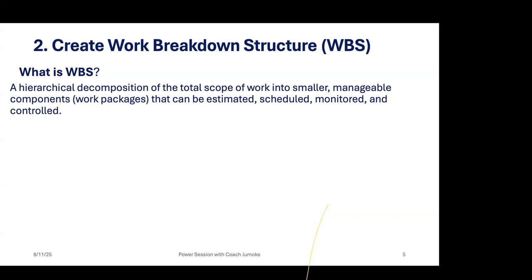You'll be able to estimate and then aggregate to get your budget. This type of budget, we call bottom-up estimation. And the WBS will also help you to monitor, because the work packages, the deliverables, you look out for them, and it will also help to control them.